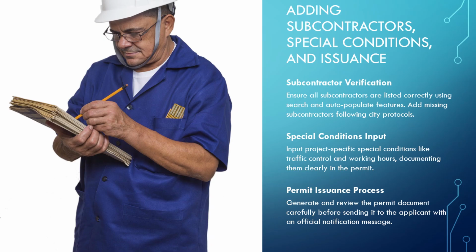Next, input any special conditions required for the project, such as traffic control measures, working hours, or restoration requirements. These conditions must be clearly documented and included in the permit.